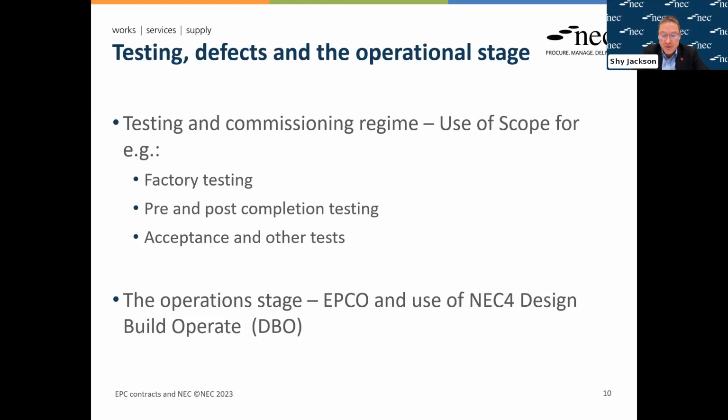The other things that we tend to see in relation to EPC contract is that there's much more of a provision for things like spare parts to be available, especially if the plant is operated over a long period of, say, 30 years or so. And the other thing that is perhaps sometimes a bit different is that the role of warranties from the equipment suppliers is also quite important where you're looking at bits of complex engineering.